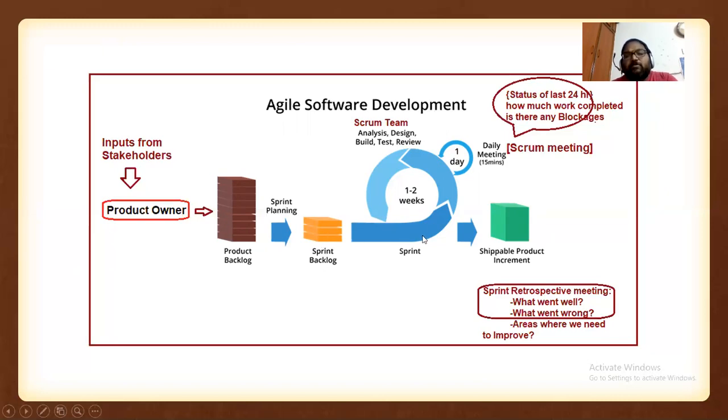Then there will be a Scrum team. The Scrum team members are the Scrum Master, a few developers, and test engineers. The Scrum team size is going to be 7 to 9 members, with about a 3:1 ratio of developers to testers, so one or two test engineers, 5 or 6 developers, and one BA, business analyst, or Scrum Master as we call it nowadays, instead of business analyst.